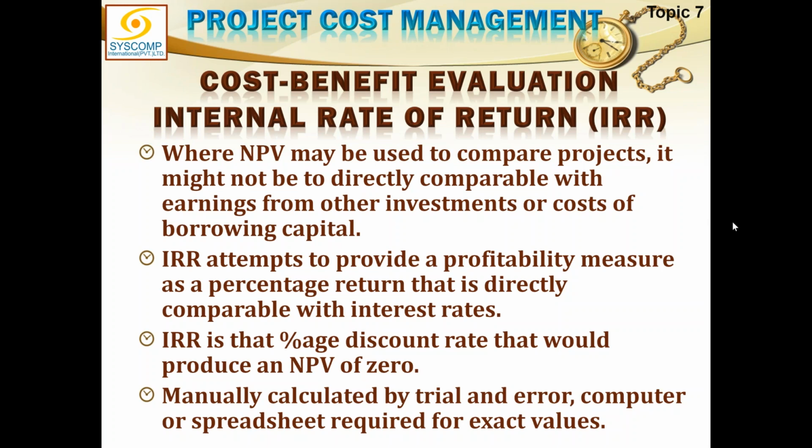No. You are totally lost. I am saying about NPV. If the NPV is more than zero, a positive value, it is good. It's a profit. Yes. And if NPV is less than zero, a negative value, then it is bad. But if NPV is exactly equal to zero, then no profit, no loss.